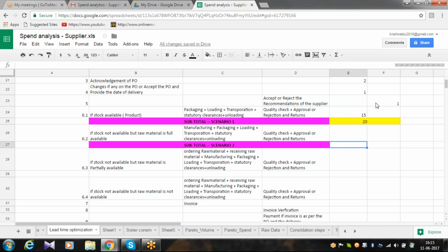Let's put in one quality check. It will be more than that. So we have the quality check and approval for rejection of item, right? This also will take around 2 days. This will become 22 days.